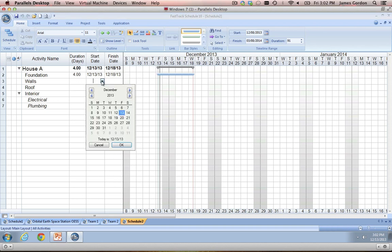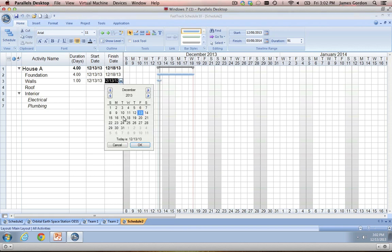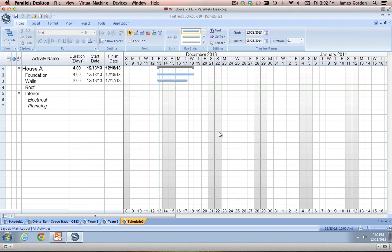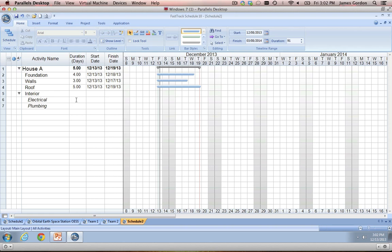Another way to put bars onto the Gantt chart is by choosing start and finish dates for each task. FastTrack is also a drawing tool, so if you'd like you can actually just go in and draw the bars directly onto the Gantt chart. Now that we have all our tasks on our Gantt chart, we see they are all starting on our project start date. In most projects you're not going to be able to start one task until the task before it has been completed — we're not going to start building the walls until the foundations are complete, and we're definitely not going to start working on the interior until we have a roof over our heads. So what we're going to have to do is create some links and dependencies in our schedule.